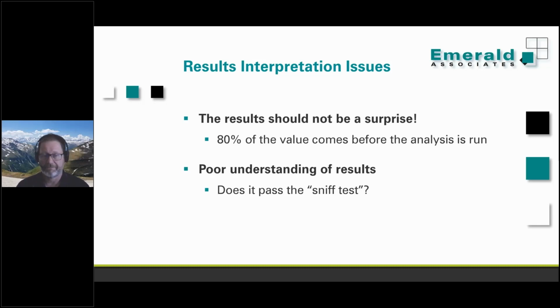The next thing is, does it pass the sniff test, right? So my client who phoned me up last week said, I got a 3-year project with 3 weeks between the deterministic date and the P80 date. That doesn't pass the sniff test. Sure enough, there was all kinds of mechanical issues with the schedule. Should he have maybe checked the schedule first? Maybe, but at least he caught it here before he gave it to management.